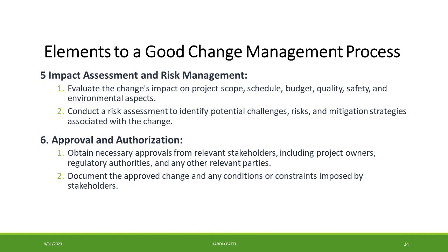Thus, it sums up to evaluating the change's impact on project scope, schedule, budget, quality, safety, and environmental aspects. Conduct a risk assessment to identify potential challenges, risks, and mitigation strategies associated with the change.